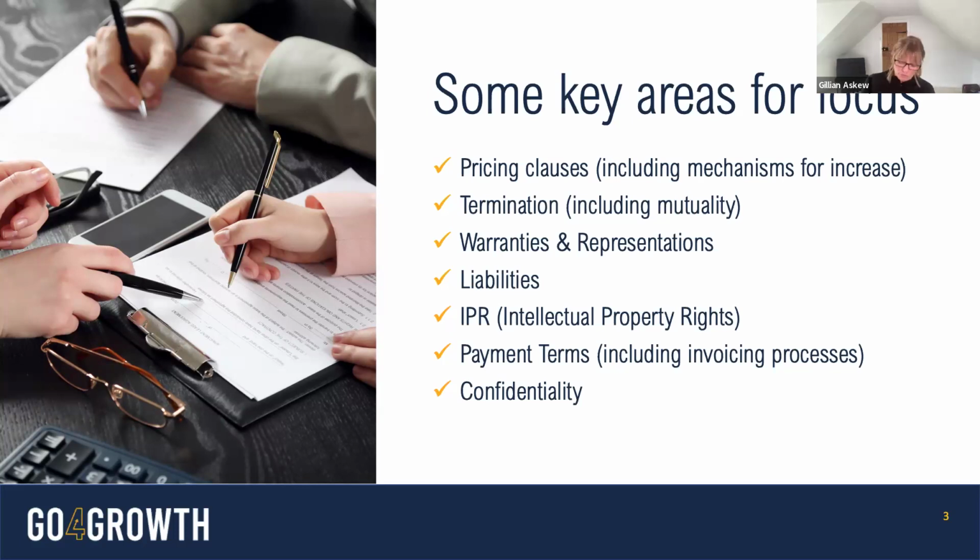If you want to, through the clarification process, you can challenge the mutuality of the termination for convenience clause. And it's up to the contracting authority whether they are willing to change that termination for convenience clause to make it mutual. Or if not, you can also ask for the notice period to be extended to something that feels more relevant and proportionate to the contract value, the contract risk, and the impact it might have on you as a provider. And again, that's for consideration by the contracting authority, but you can ask them to have a look at that.